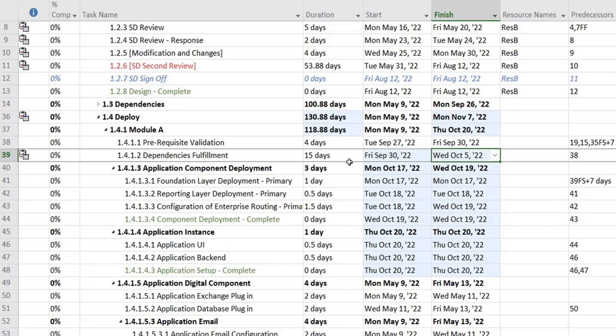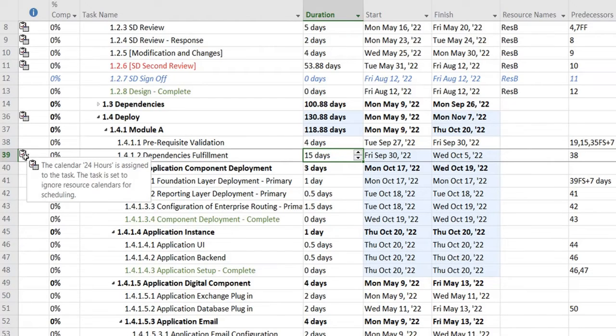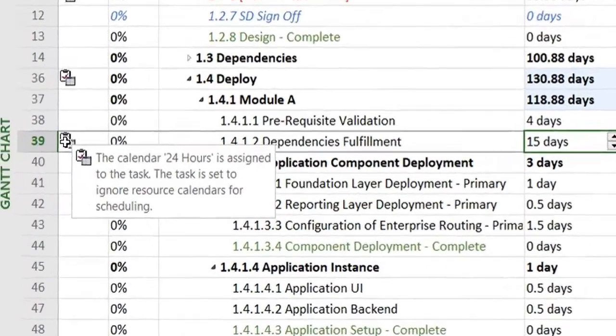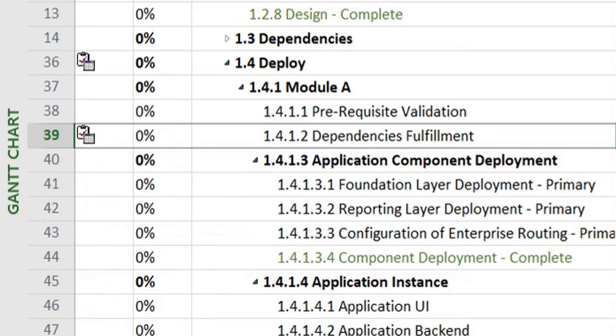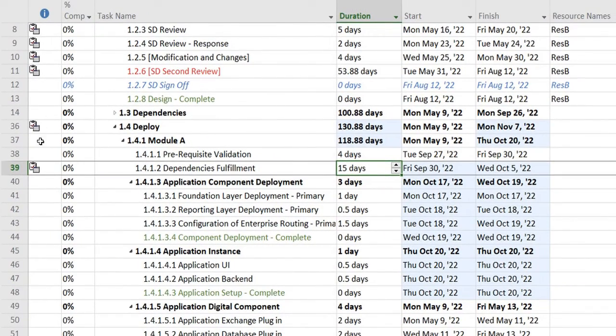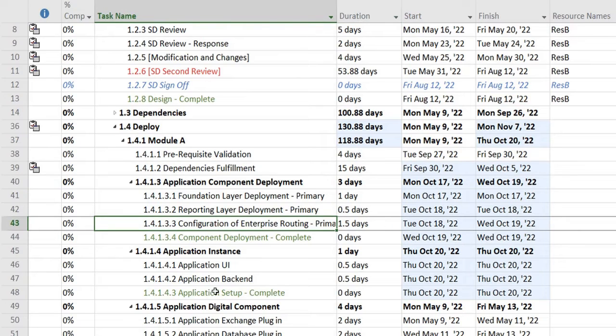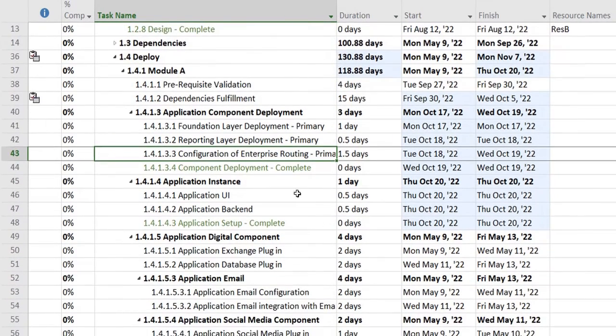So it has changed the duration of 15 days, applied it across 24 hours, and you can see this intimation in the indicator column over here. It's showing you, if you take your mouse cursor over there, that the calendar 24 hours is assigned to the task, so you know that if there's any specific tasks using a 24-hour calendar.